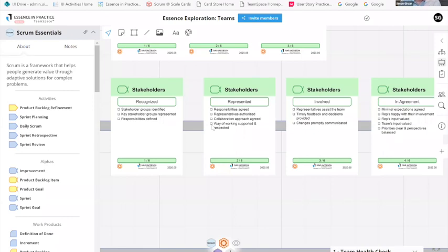So this is a real example where a project I worked on, luckily it wasn't one I was responsible for, where they were quite far through an endeavor and one of their stakeholders had changed and they hadn't realized. What ended up happening was the strategy shifted a little bit. They worked towards the old strategy, they delivered, and nobody could use the product.